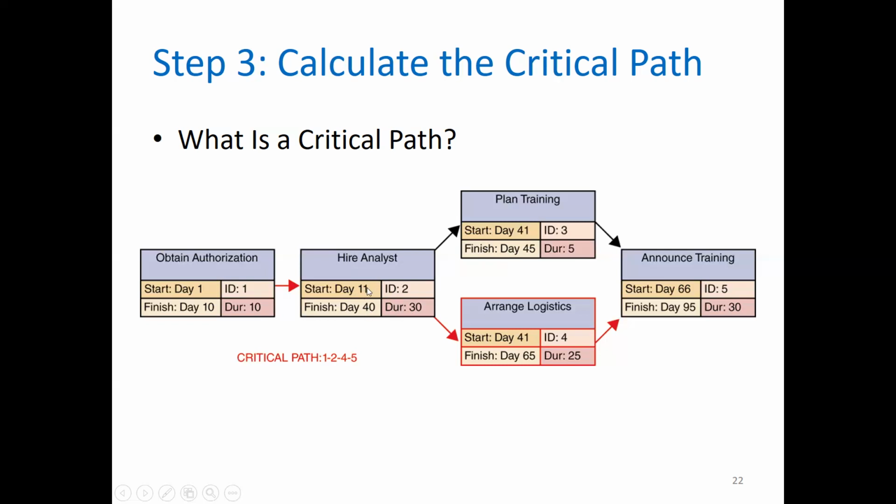So it gives you, inclusive of 30 days with 11, would be 40. The next task starts on 41. Or, if you do not want to confuse yourself with the inclusion phase, what you can do is consider this: it finishes in 40. So 40, the finish date of the previous task, plus the duration of the current task. So 40 plus 5 gives you 45.